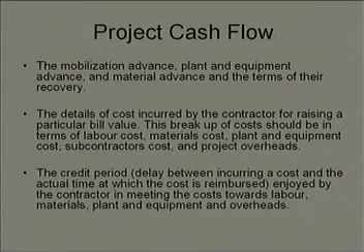So, in construction you will find that in most of the countries the credit period goes between 4 to 6 weeks, right. But for labor normally no credit period, right, nil. Credit period is nil for labor. You can take for plant and equipment, for subcontractor and for material supplier between 4 to 6 weeks, right.